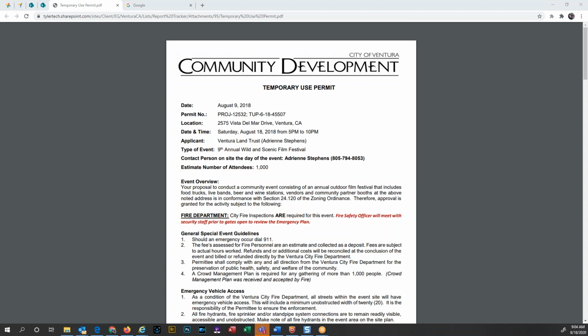Kurt, I also want to make this point: to get things working fully, any questions you ask in CSS, if you were to add more questions or anything additional, you'd also have to add it in the back office as well. All the way back. Yep. So if you want changes made to things in CSS that aren't currently there, you also have to make changes to the back office, and it kind of brings us right back to where we were to begin with.